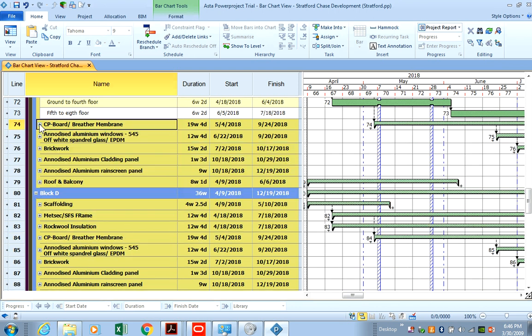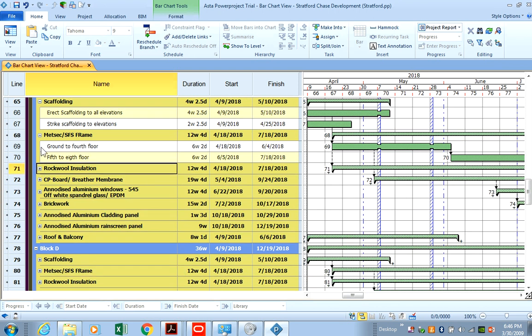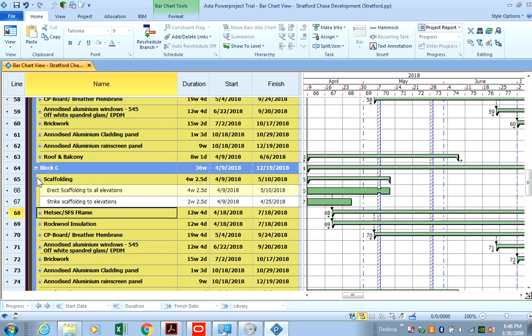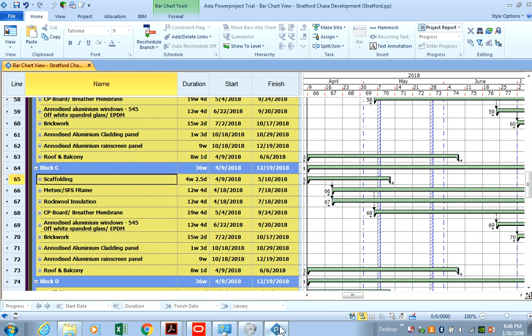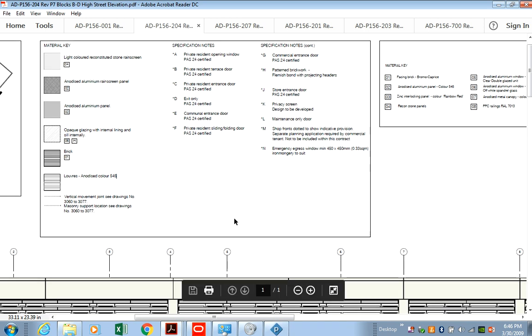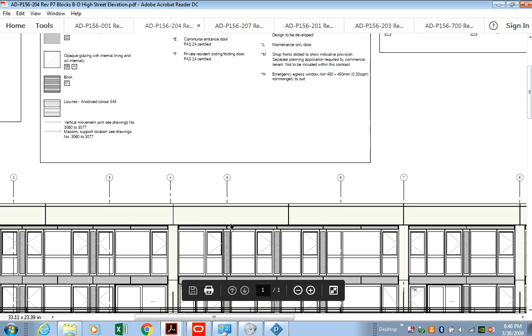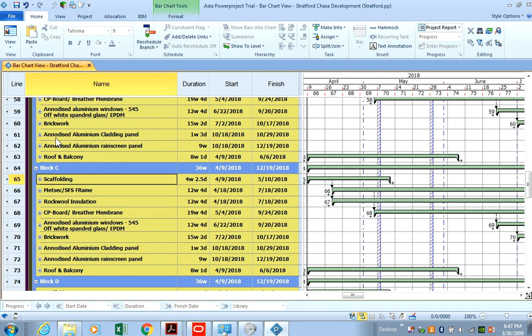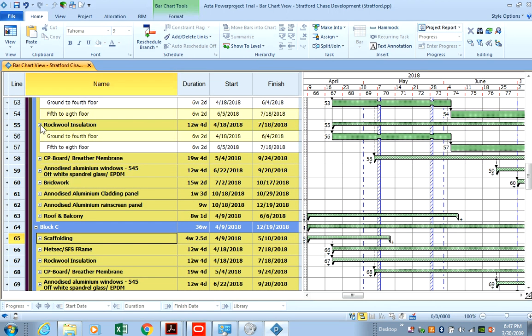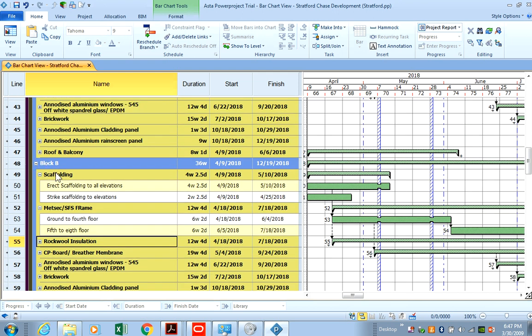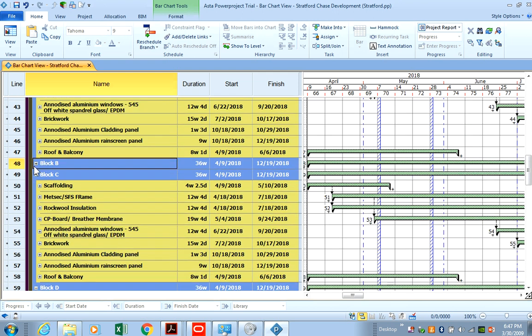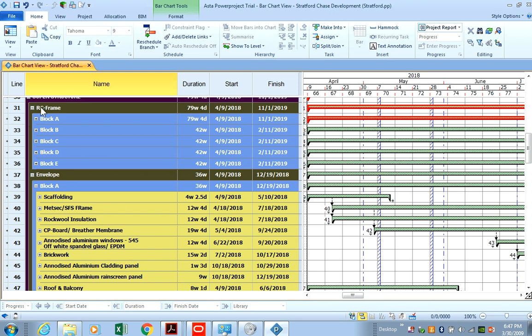Usually off of the drawings we would do the program development, which is what we're doing now. We've managed to do this within a couple of hours, but usually you'll probably be given about 2-3 weeks to build this. Okay, but we're literally doing it as quick as possible. But the idea is, if you understand how to read the drawings, you understand the full scope, you know exactly what the building sequence is, you apply your planning knowledge, which is obviously building all of the packages under their required WBSs, which is the block B scaffolding, etc., under the envelope and under the RC frame.